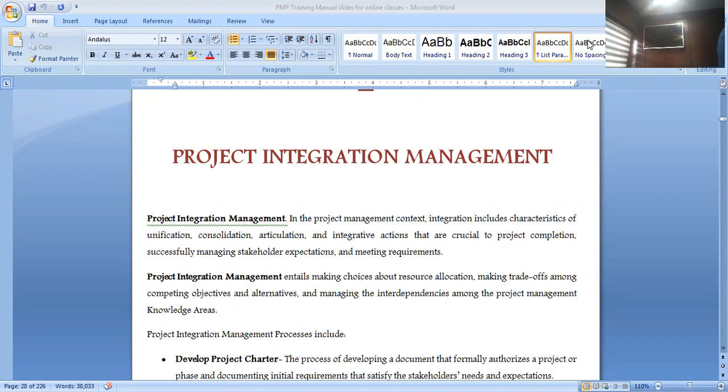What is the first one then? We come up with a risk management plan: how we will be carrying out risk management on the project. And then we'll sit down to identify those risks. We think through the processes. I think under this area, we could be facing a weather challenge. I think here we face a transportation challenge, maybe delay, and we'll start thinking about that.